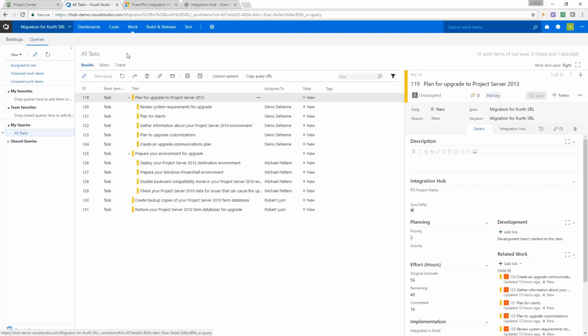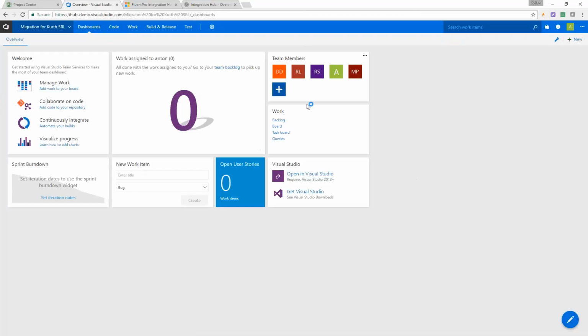One more note, as I started talking about the resources for your project. What you need to do here is make sure that you build a team. It is required that the same resources that are on the project plan exist here. We do not control that process right now, so you need to make sure that the team is built. If there is no resource, the task will be created, but it will have no assignment. The log will say that the system couldn't find the resource by name. So you will be able to take control and see all those changes.